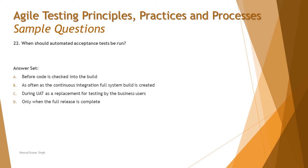Looking at the options: Option A says 'before code is checked into the build' — that's not the right point because the developer hasn't even checked the code in yet. After check-in, there will be build integration, stabilization, and regression checks to ensure stability before going to the business. So it's too early to conduct acceptance tests, and A can be ruled out straightforwardly.